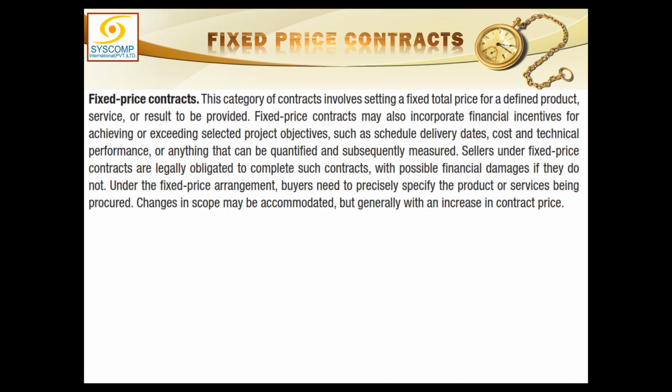So if I agree and we sign, then whatever has been agreed, this is from now onwards complete responsibility of the contractor to create. I am not going to pay him anything extra in any case. And if he can take this risk, he can do this job and no risk occurs, he is lucky.